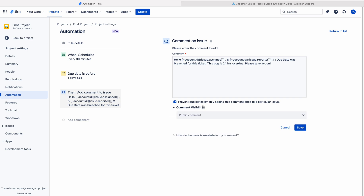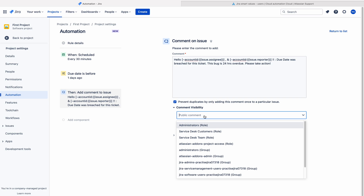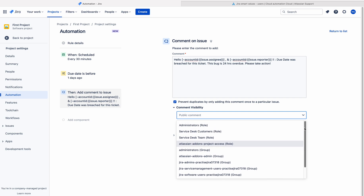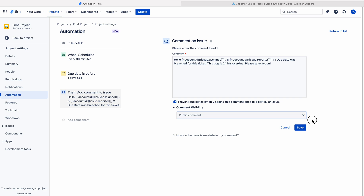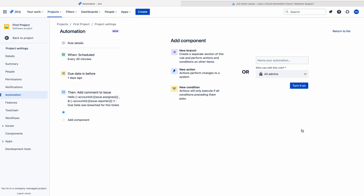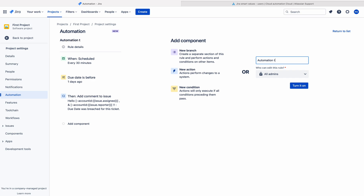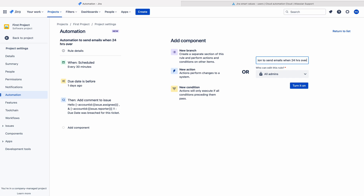There is also a comment visibility option — you can restrict visibility by adding a group, or choose public comment so everyone can see it. Save the rule, give it a meaningful name such as 'automation to send email when 24 hours overdue', and turn it on. Reading from top to bottom, the rule states: when scheduled every 30 minutes, and due date is before one day ago, then add a comment to the issue.